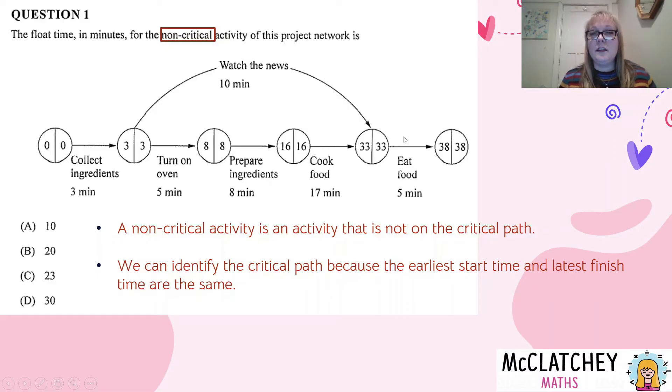So if we look all the way across this central line here, we've seen that the numbers are the same, 0, 0, 3, 3, 8, 8. So this is our critical path across the middle, which means that watching the news is our non-critical activity, and it's the only one we're interested in in this network.